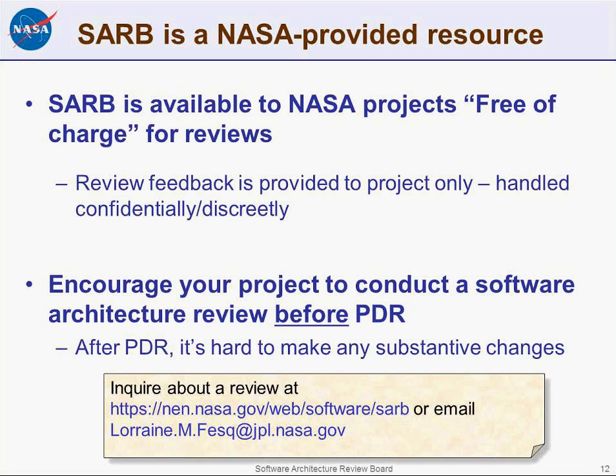It does take time of the project people to work on. We typically ask the software architect on a project for documents ahead of time, like maybe a month ahead of time, and we start reviewing them and giving them feedback, and then they work on the documentation, and by the time we review, it's much more effective. So it's really helpful. We don't just go in and say things and then leave. We work ahead of time to help get your documentation ready for review. Projects engage in these architecture reviews before PDR.